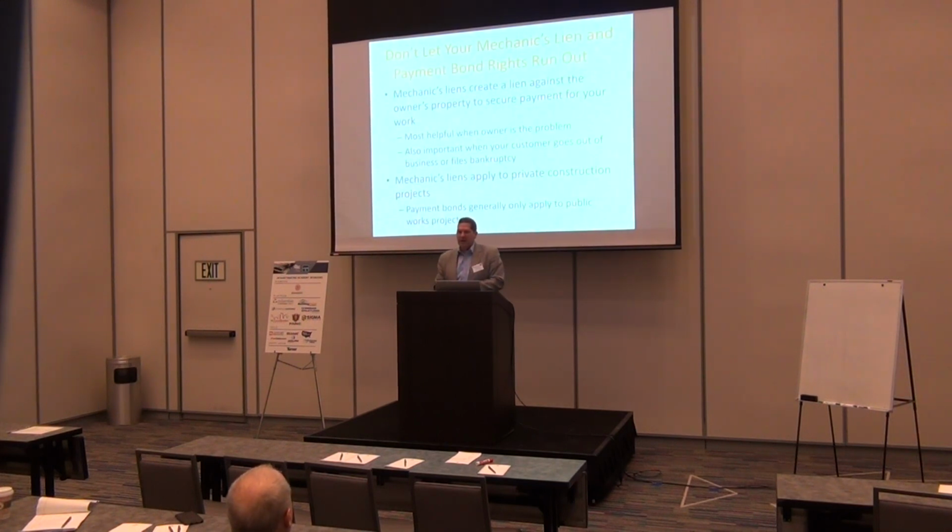All right, so after you've kind of gone through that, you haven't gotten paid, you're talking to your lawyer. The advice is don't let your mechanics lien and payment bond rights run out. I can tell you stories about a client who called me up, done good work on a project, didn't look like they were ever going to get paid, they filed a mechanics lien, it sat out there for months and months and months, and one day they got a call from a title company and said, we want to verify the amount of your claim, and they got a check. And if they would not have done that, they would not have gotten paid.